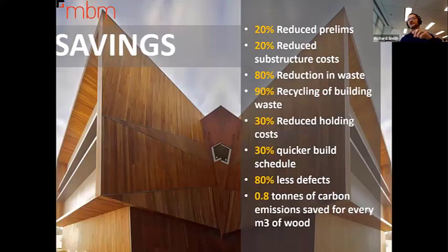There are the savings. You'll see at the minute, the prelims, reduced substructure, for lighter construction. I haven't got superstructure in there at the minute, simply because I don't think there is a saving in superstructure at the minute. It was in my last talk 12 months ago. It's not in this one, just simply because I have an obligation. Sorry to be honest here. But the speed and all the benefits you can see there are real savings.